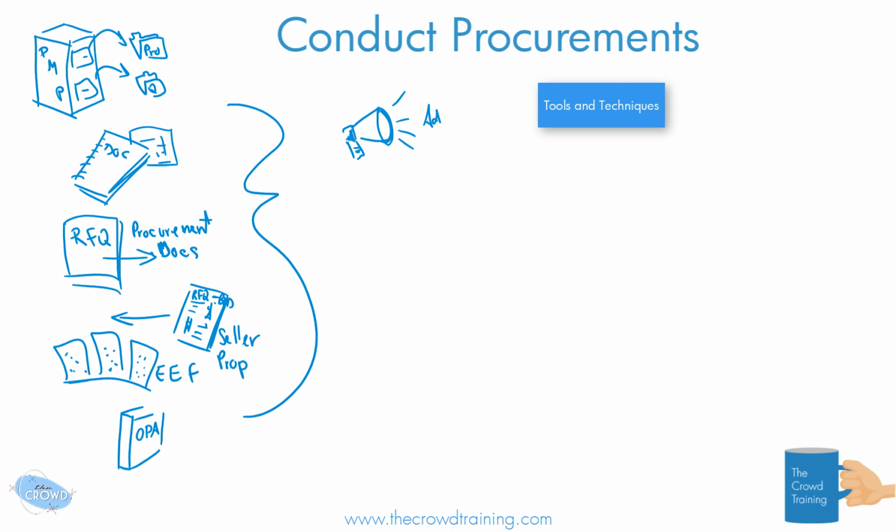Okay. And then also, you can have a bidders conference where you bring everyone together, and then usually somebody on your team is going to go through the proposal line by line, or at least review it in some sort, so that everybody gets a fair shot at understanding what is in this bid, and that if there are any questions, everyone hears the question at the same time.